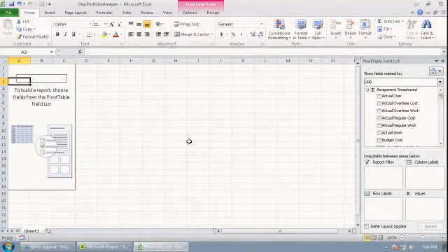So what I want to do here is first I'll show you how to model the demand. And again, we're modeling demand in Project Server in this case by looking at how much work is assigned to the generic resources in our system. So when we're generating our pivot table here, the numeric data that we're breaking down is going to be assigned work.